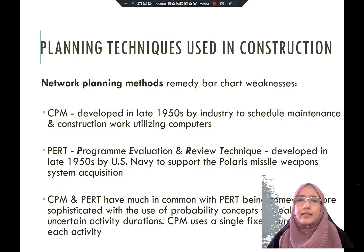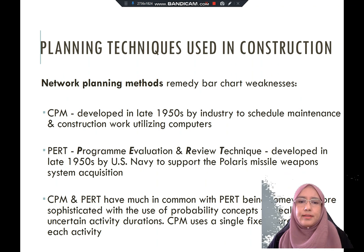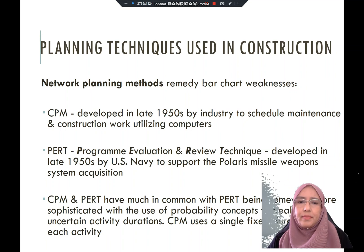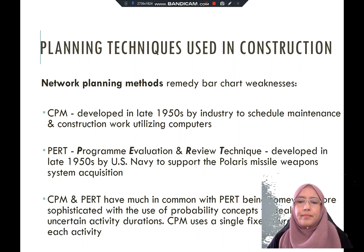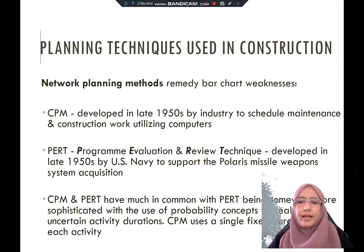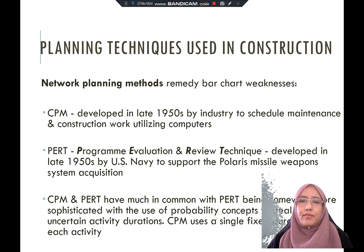To overcome the weaknesses of the bar chart, several network techniques were established. CPM was developed in 1950, and PERT — the program evaluation and review technique — was also developed in 1950 by the US Navy. CPM and PERT have much in common. PERT is usually used for sophisticated projects because it uses the probability concept and deals with uncertain activity durations, while CPM uses a single fixed duration for each activity.